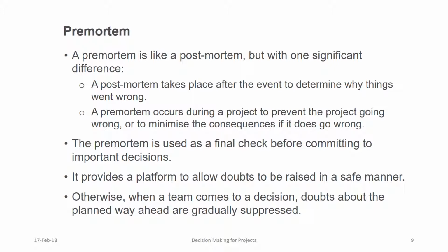The pre-mortem is a tool that can be used as a final check prior to committing important decisions. In contrast to a post-mortem, which is carried out after the event to find out why things went wrong, a pre-mortem occurs during a project to prevent the project going wrong or to minimize the consequences if it does go wrong. Research has found that if you imagine that an event has already occurred, it increases your ability to correctly identify reasons for future outcomes by 30%. This concept was used to create the pre-mortem, which provides a safe environment for project team members to identify weaknesses that could result in project failure.